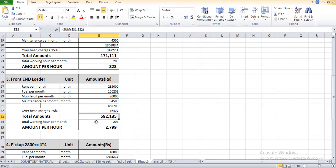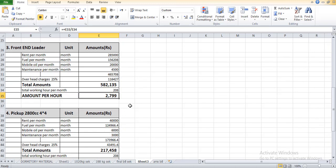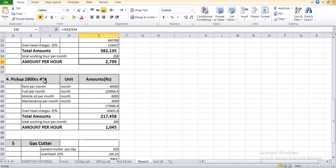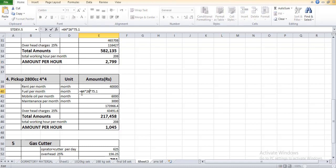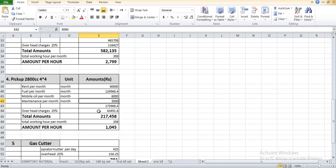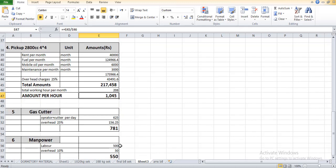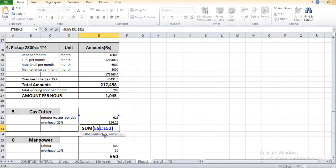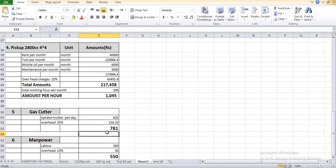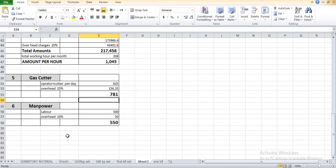Similarly for the pickup 4x4, the rent is 40,000 and they require 64 liters. The maintenance cost is 3,000. The total cost is 73,966. The total amount is 1,045 rupees per hour. The gas cutter operator per day cost is 602 and 781. Because there are some uneven circumstances that come, we consider overhead cost which we already studied in project management. For the manpower it's 550.